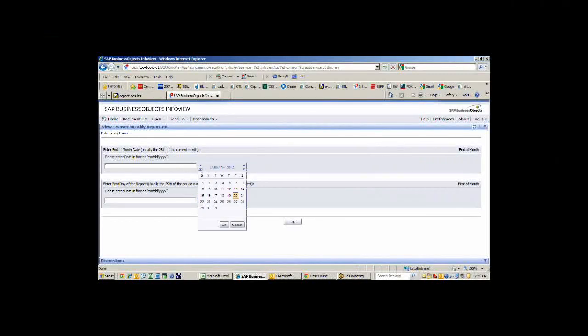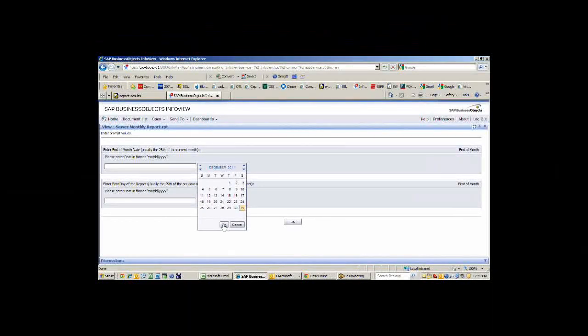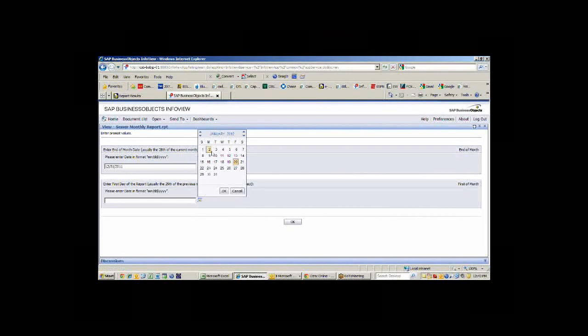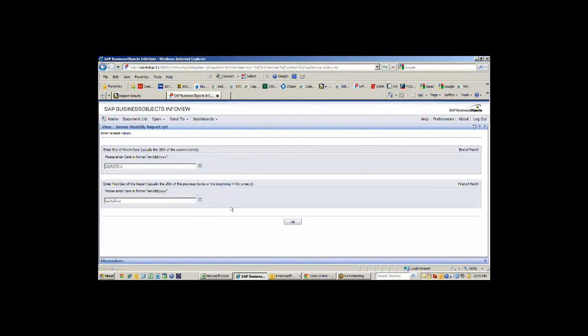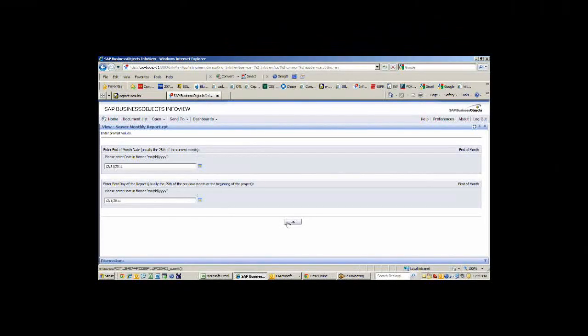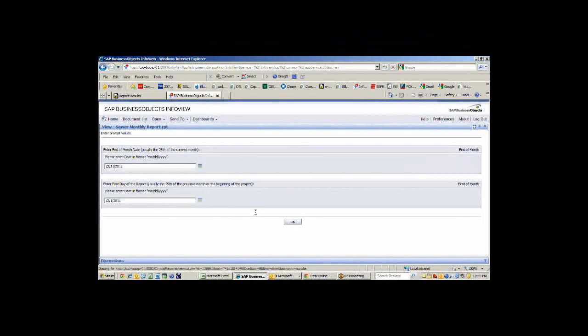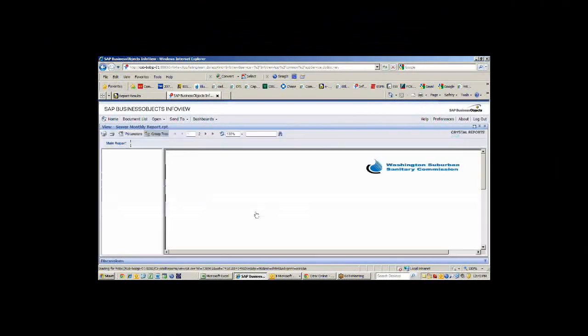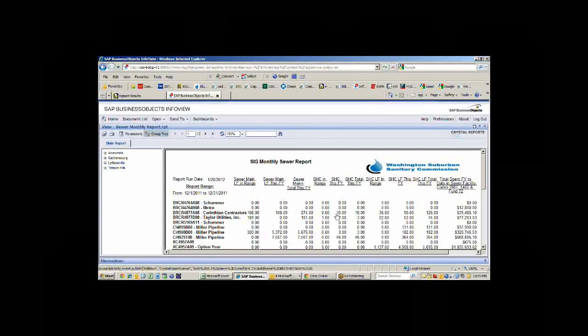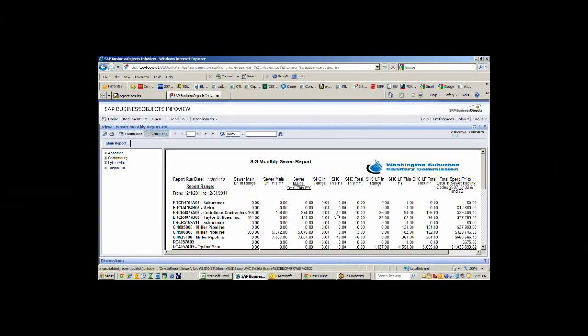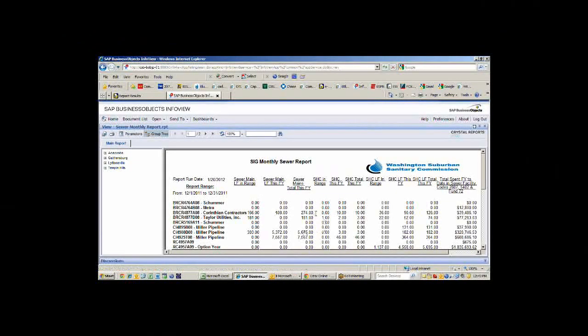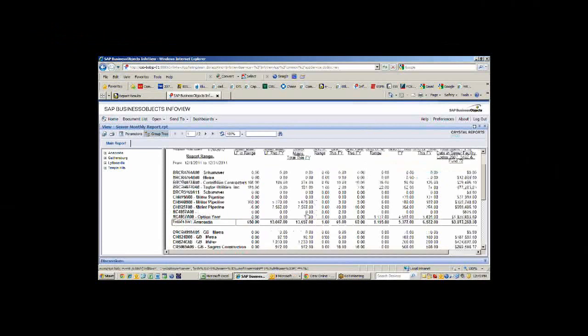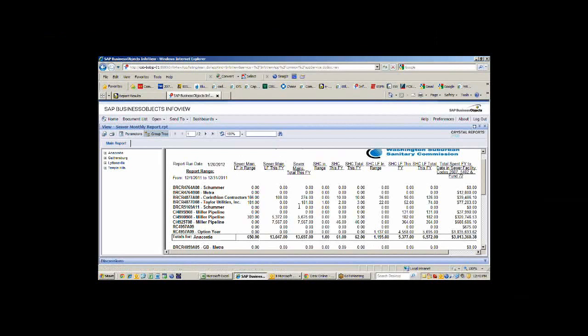I'm just going to show you one more report here. This is our monthly sewer report. We have a similar report for water. But this allows us to look back over the month and see exactly how much we've done in every project. It's basically taking the same information that we saw in eBuilder and we're able to compile it by adding up totals in a little different format than what we would get in eBuilder. But this is all the data that's coming from eBuilder.